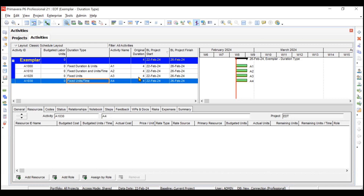All activities have a duration of four days. Activity one is Fixed Duration and Units, which means units and duration will remain fixed for this activity. Fixed duration means the total duration of four days will remain irrespective of how many resources you assign — the duration will not change at all. Fixed units means the total number of units; for example, if you assign some labor, the total budgeted number of units will remain the same.